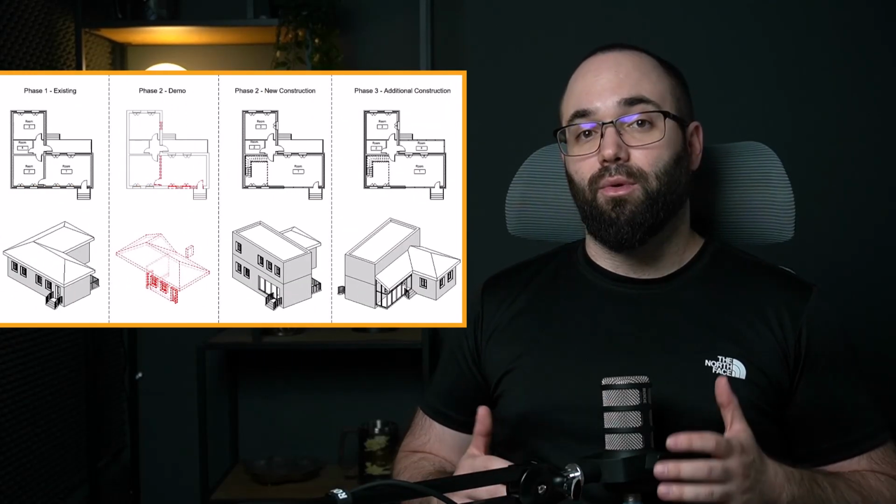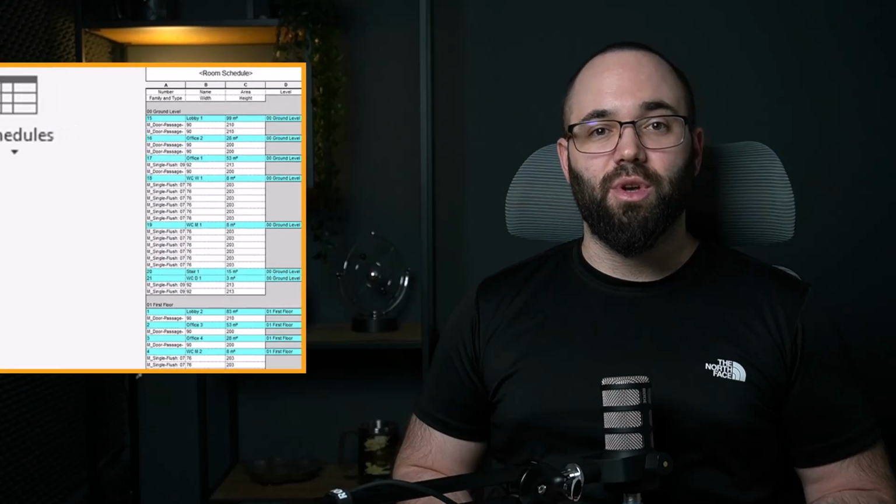You have your building tools that you use to build the model. Then Revit allows you to cut up the model to create floor plans, sections, callouts, elevations, camera views, and more. Now, apart from all of the graphical views, you can create material takeoffs, schedules that use all of the parameters that you've built into the model. So this means that for our wall schedule, we can calculate not only the total area or volume of the walls, but also their total weight, cost, and other parameters that we decided to include.